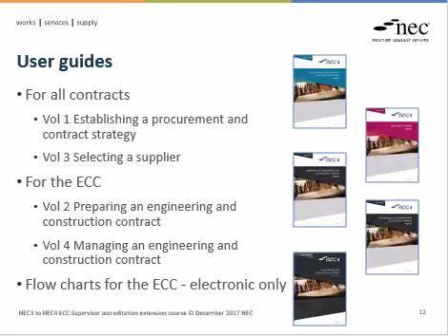There's a user guide for establishing a procurement contract strategy, volume 1, which is applicable to all NEC contracts, and volume 3, selecting a supplier, is also applicable to all contracts. And then for each individual contract, in this case the engineering and construction contract, volume 2 deals with preparing the engineering and construction contract, the contract strategy stage, and volume 4, which is much more akin to what the supervisor would be involved with, is managing the engineering and construction contract, the processes and procedures you put in place to manage it while it's on site.